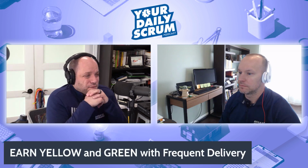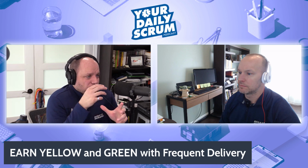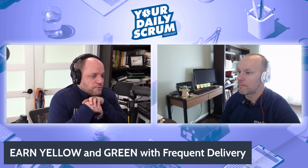Yeah, I think you earn yellow and green with frequent delivery. Right? I think that's the message here. And that's the behavior that we start to shift. So people ask, well, what can we do in this traditional environment? How can we start putting agile ideas and practices in place? How do we get people thinking the way we need them to think? Start red. All you have is a plan at the beginning. You don't know anything yet. You earn yellow and green with frequent delivery.